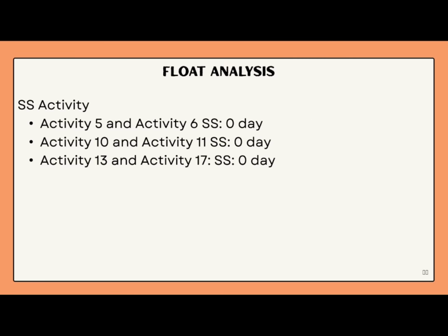And there are 3 SS activities: activity 5 and activity 6, activity 10 and activity 11, and activity 30 and activity 31. Those SS relationships, which could easily take 50 to 60 days, were safely compressed to only 26 days without compromising safety.